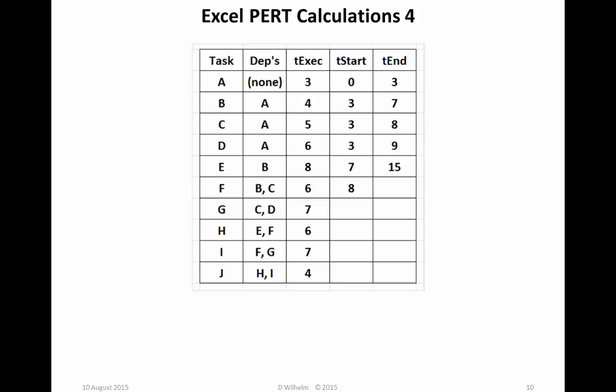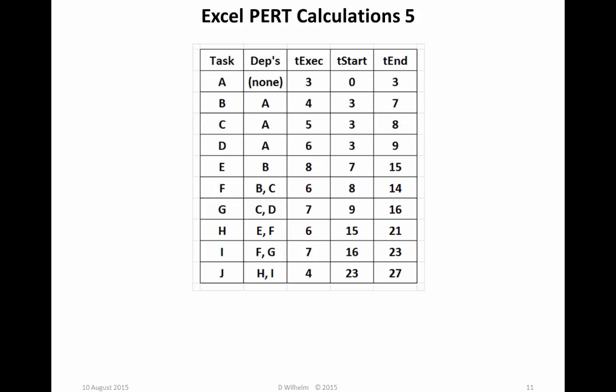The Time End F is just its execution time plus the start time. And for the rest of the tasks G through J, the same type of formula applies. The Time Start for any of those tasks is the maximum of the time ends of their dependent tasks. If you're unfamiliar with the Excel functions, especially max, you can find information on those in Excel under the Functions Information tab. And Time End J is the cumulative elapsed time for the entire project.